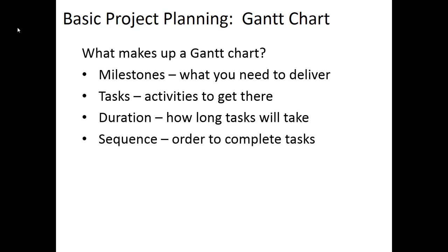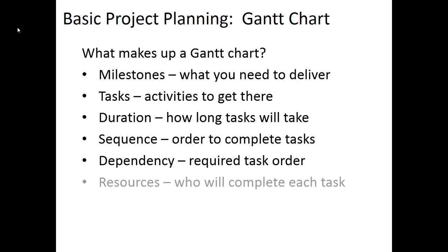You might then have to choose what activities occur before other ones. And this can be purely, well, I want to do that first and this other one comes later, or they can depend on each other. There are certain activities that have to happen before other ones because you need the information from the first activity before you can start the second one.